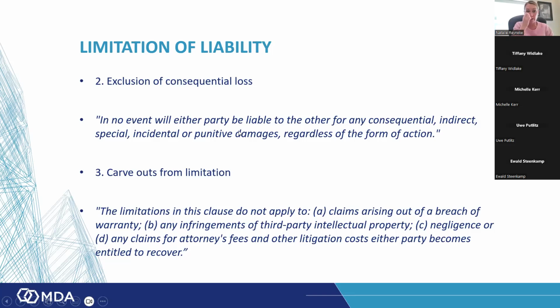Oh, and just one more thing as well, sometimes they say that if there are any delay damages or performance damages, those are also excluded from the cap. So it means you'll be liable for the contract price plus the indemnified amount plus the 10% cap on delay damages plus the 5% cap. So you can start really taking your umbrella, and when it used to look like a nice, pretty blue umbrella, now it's looking really black and funeral-like, because you're now taking on all these risks and all these exposures that you weren't aware of. So be very, very careful when you're looking under your liability umbrella.